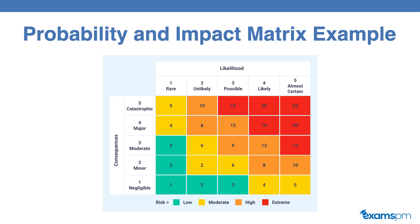If a risk has a consequence rating of five and a likelihood rating of five, that gives this risk an overall score of 25, and you can see that it is in red, which means this is an extreme risk. Based on the colors we can group risks as low, moderate, high, and extreme. Low is green, yellow is moderate, orange is high, and red is extreme. This allows us to categorize all of our risks by giving each a severity rating as well as a likelihood rating. The definitions we come up with for probability and impact remain the same throughout our project.